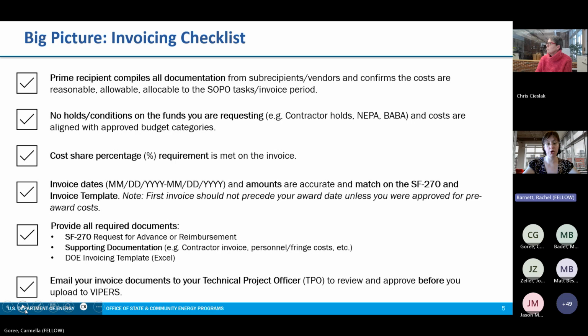Note that the first invoice should not precede your award date unless you were approved for pre-award costs. And we'll go into the relationship between invoicing and pre-award in just a moment.